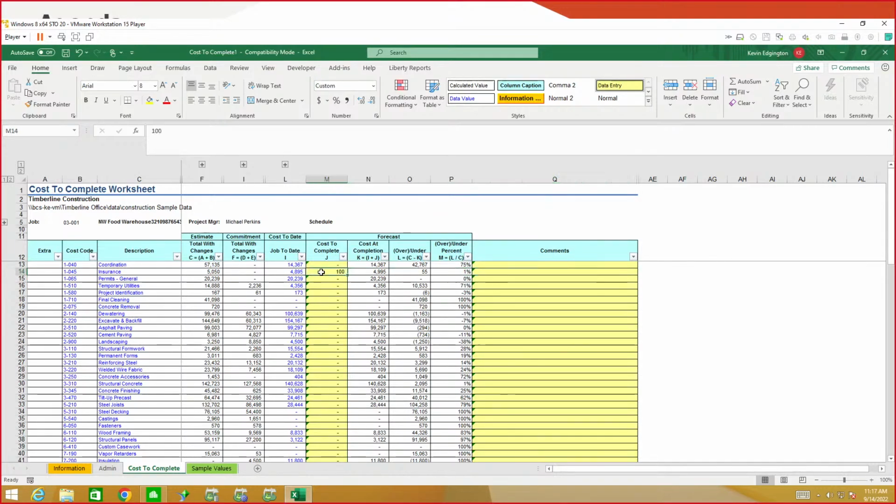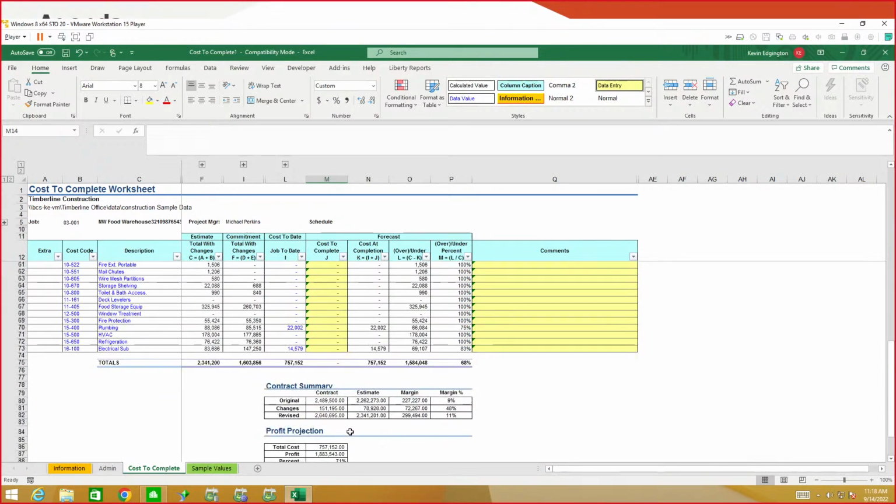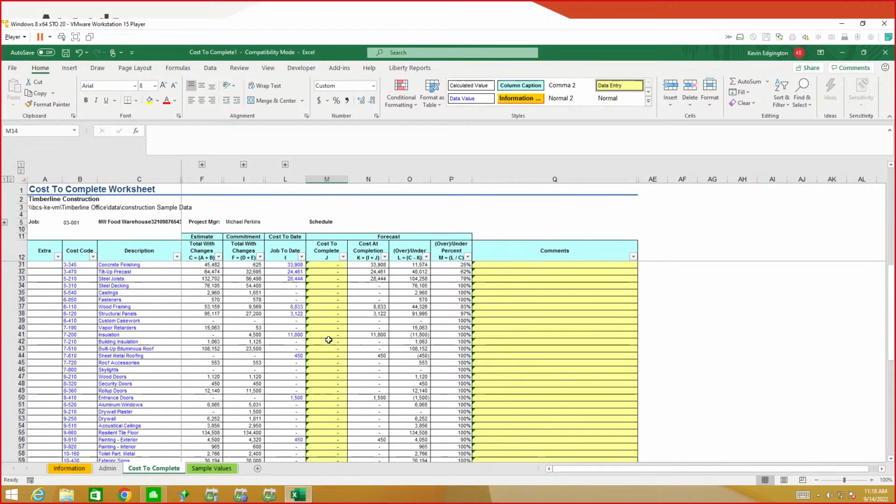And this is basically a spreadsheet that I could actually save out there, open up on a month by month basis or week by week and update information, type of thing. So there's a lot of people that would like to do some forecasting where when I dump a report out now, it's just on the paper. I can't interact with it that much. So I think that's why this one, in my mind, made a lot of sense because that way it lets me do some forecasting of things and see what different totals might look like, where we're really at on the big picture of the totals for the job and things like that when I'm doing some of that forecasting.